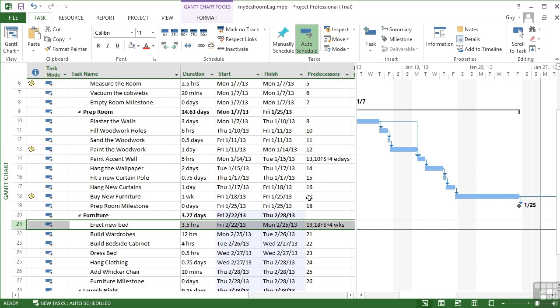That's adding a lag and exploring this new little option of E for elapsed time. And that can be put in any of the time elements in project. So you could do elapsed minutes, elapsed hours, elapsed days, elapsed weeks, elapsed months.